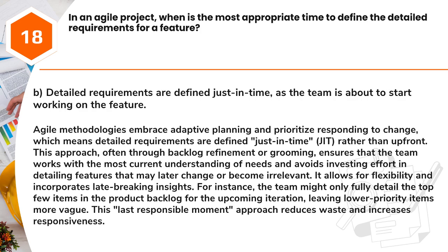Answer: B. Detailed requirements are defined just in time, as the team is about to start working on the feature. Agile methodologies embrace adaptive planning and prioritize responding to change, which means detailed requirements are defined just in time, JIT, rather than upfront. This approach, often through backlog refinement or grooming, ensures that the team works with the most current understanding of needs and avoids investing effort in detailing features that may later change or become irrelevant. It allows for flexibility and incorporates late-breaking insights.